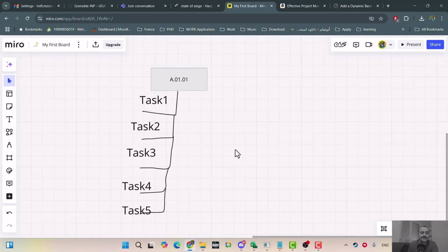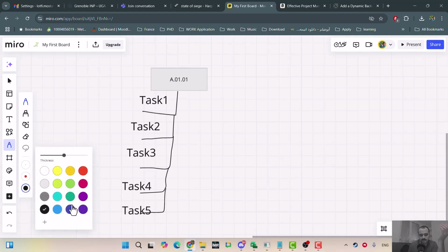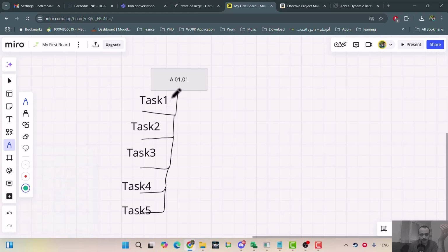What happens in the next step? In the next step, you need to identify who will handle each task. For example, for task 1, what resource can handle this task? What resources are available to do this job? It's very important because based on that you can identify how much time is required to finish this task, and based on that you can estimate how much it also costs.